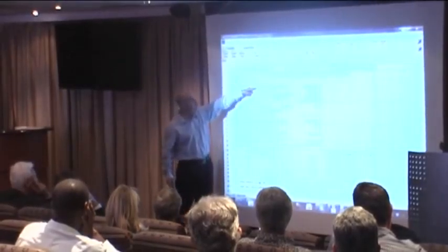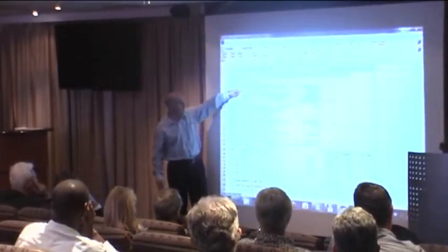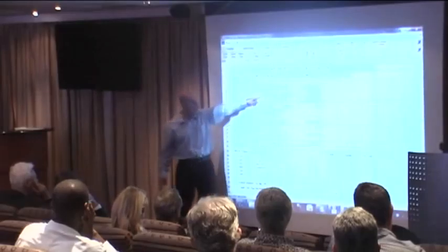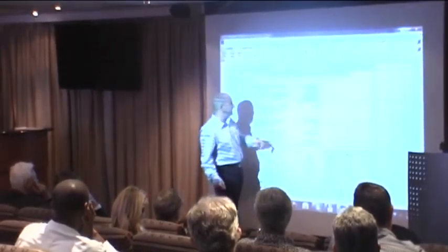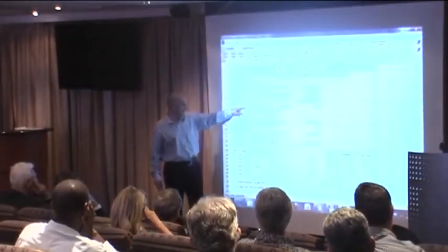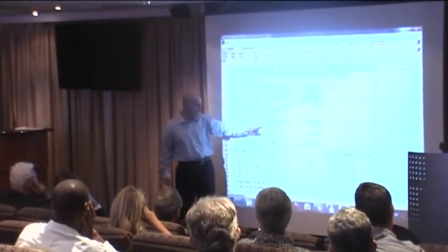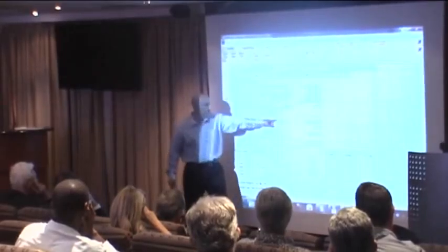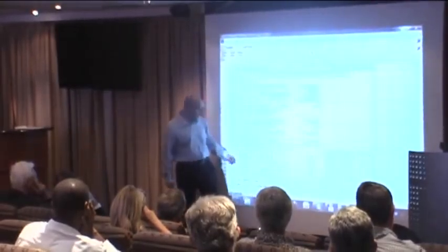Basic value for fee purposes 23 million, primary charge marginal rate of 6.5%, basic fee 1.6 million. Is it alteration work? Is there an additional percentage? Is there a discount? Nothing at this point. Total 1.6 million. How is the fee being split?